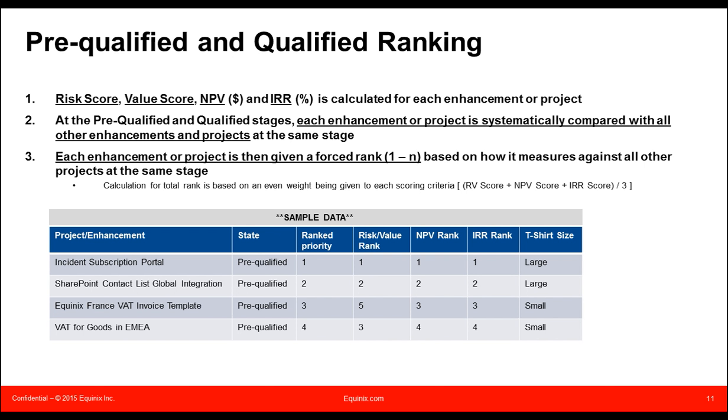Are there project benefits being gained immediately? So how quickly are we actually going to see benefits by implementing this? Is it going to be within the first month? Is it going to take a year before you really start to generate value out of this? How much financial benefit is expected? Some of the questions are yes or no, some of them are high, medium, low. So we have varying answers and the score is assigned based on that.